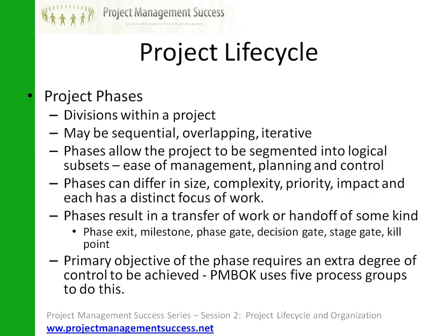So, project phases. All projects, regardless of size and complexity, follow that life cycle structure. But within projects, there are phases. They are divisions within a project, and they can be sequential, overlapping or iterative phases. Phases allow a project to be segmented into logical subsets, for ease of management, planning and control. Each phase can differ in size, complexity, priority and the impact it has on the project. Each phase generally has a distinct focus of work. And the end of phases usually results in a transfer of work or a handoff of some kind.